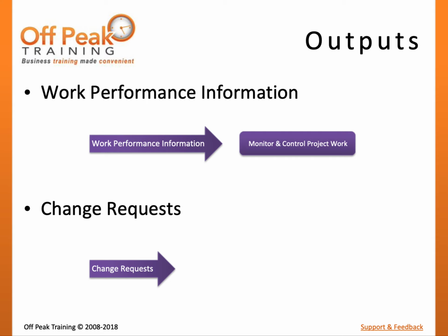As the project environment changes, it is inevitable that changes will be required when actively managing risks. If controlling risk will require a change to the scope, schedule, or cost baselines, then a change request must be issued. For example, if the project team would like to alter its response plan to include a new work package that was not originally planned for, a change request to the scope statement should be issued.